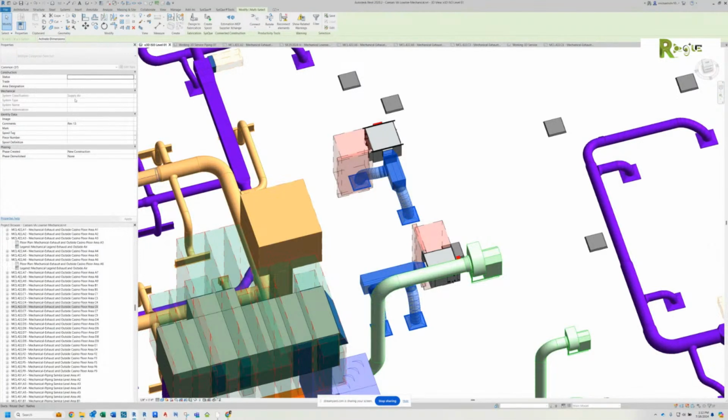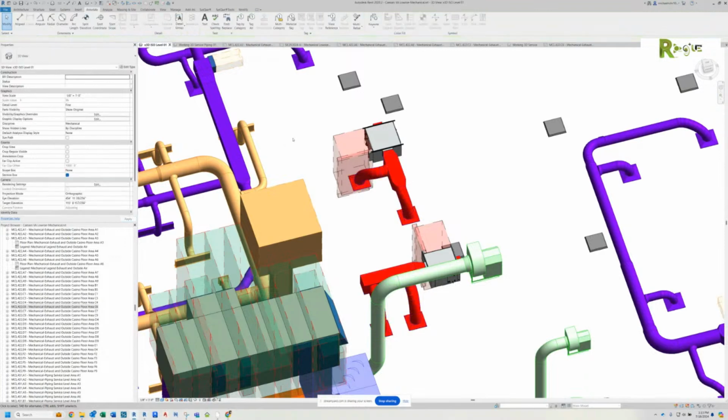See, me personally, I would have been tabbing on the VAV. That would have grabbed the return and the exhaust for each one of those. Well, I just stuck that on there to make it not be purple. Yeah. So you want that under trade as well? Trade, that's going to be electrical rooms. See, then we can tell him just go get all the ductwork that's in electrical and Starbucks. And that's what needs to be fabricated. Perfect.